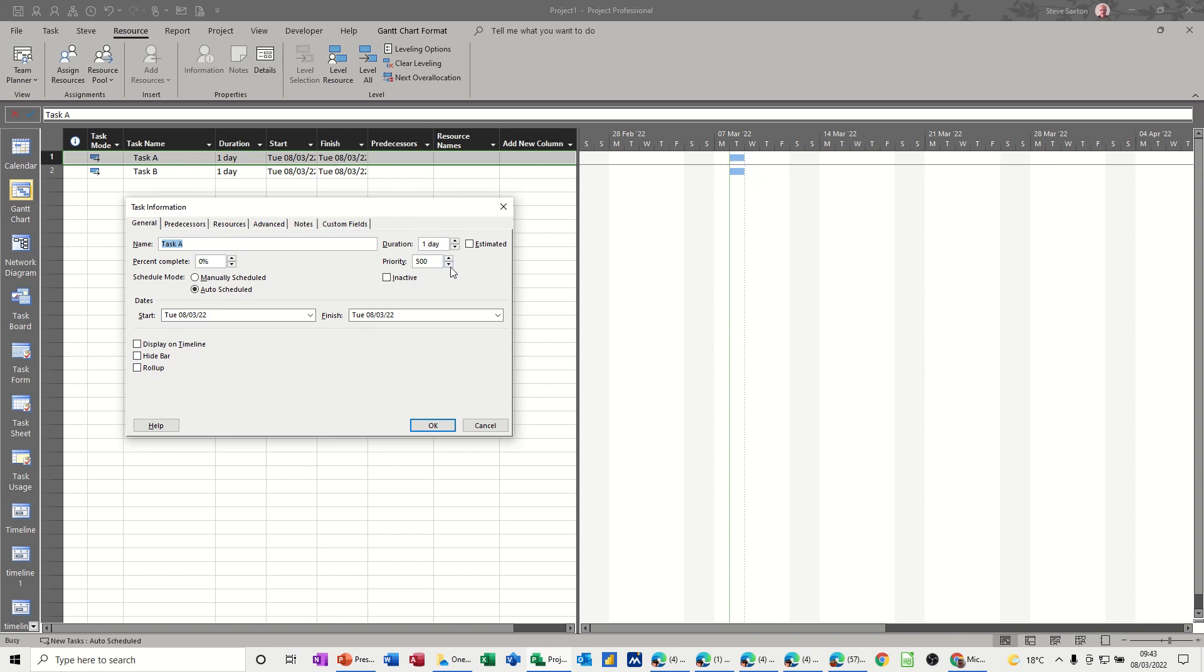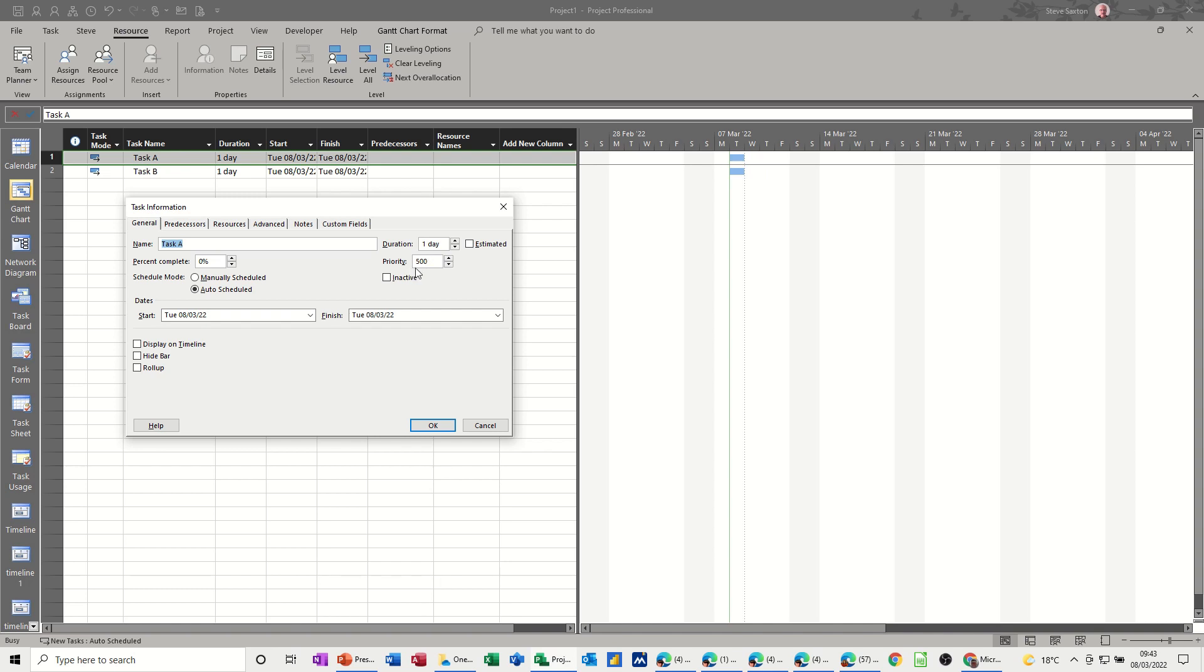Now that can change from 500, any number between 1 and 1,000. So 1,000 would mean this task is more important than a task with a priority of 500. Now normally you have to come up with some sort of rationale for setting numbers. I don't suggest that you go 1, 2, 3. I would recommend that you do it in groups, maybe engineering tasks are 600, which means they're more important than admin tasks, which you might set at 400 for example.